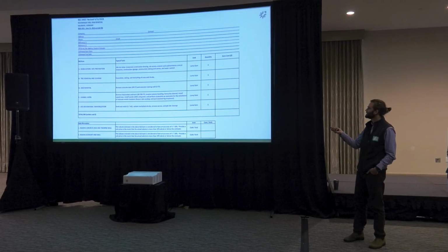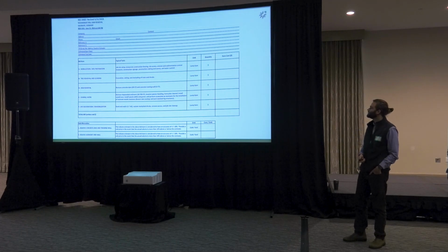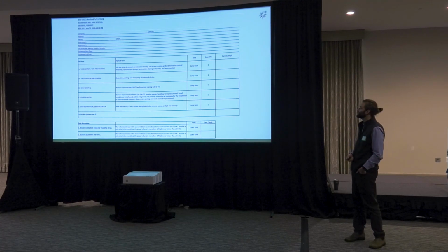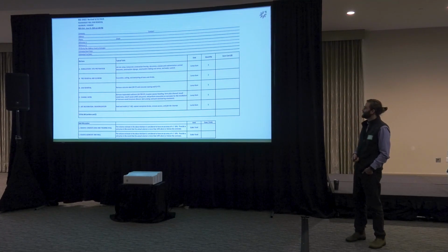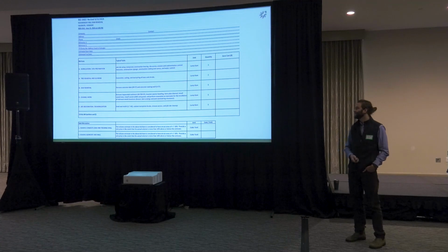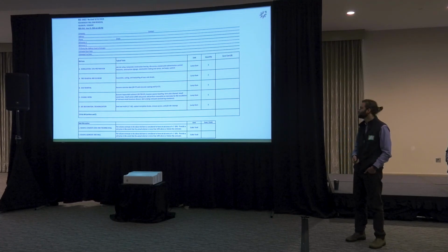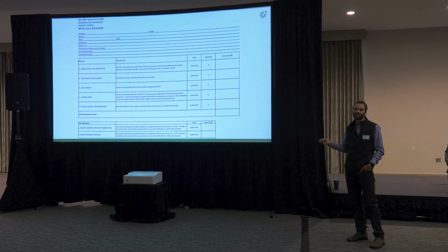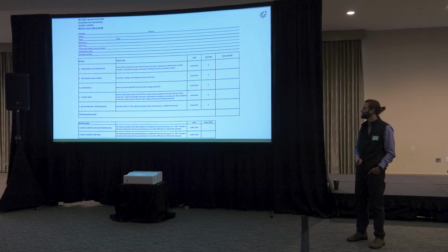So we typically lump sum some of the aspects of the project that go together: mobilization, site preparation, the actual dam removal itself in this case, the channel work, including all of the sediment removal and haul, and finally site restoration. And at the bottom there, we have a couple add alternates.